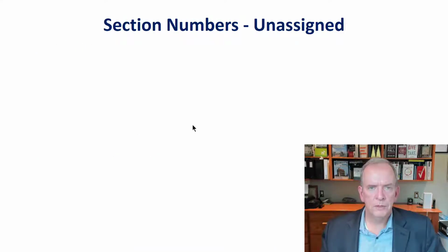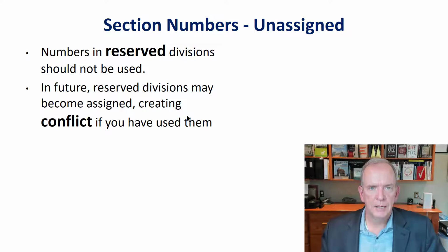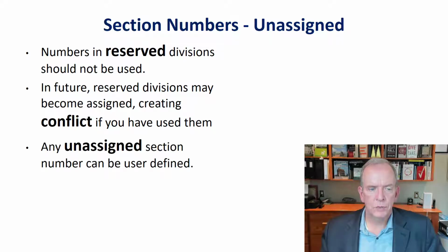So we were talking about master format, and we were looking at the 50 division format, which is 0 to 49. We said there are some sections that are reserved for the future. Whoever's writing specifications shouldn't be stuffing things into them.